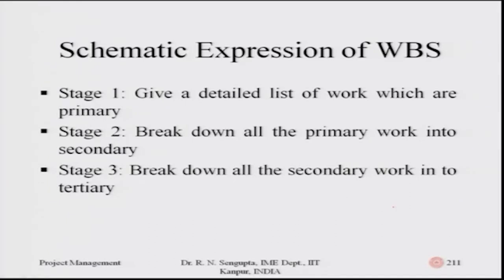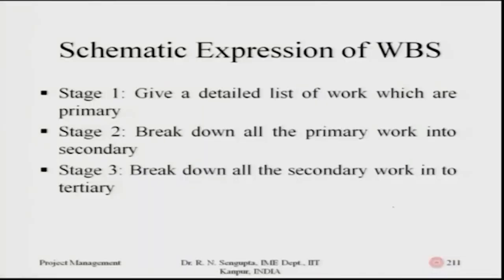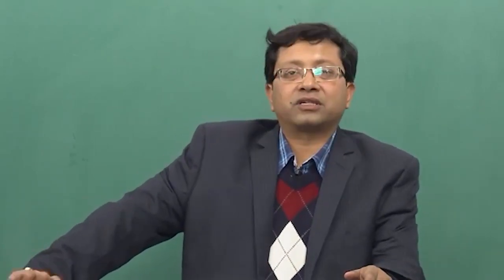Stage 2 breaks down all the primary work into secondary, and what are the linkages between the secondary work inside the primary one, and if the primaries are related to each other or secondaries are related to each other. Stage 3 breaks down all the secondary work into its tertiary one, and also tries to find out whether after the tertiary we have the first level below tertiary, second level below tertiary, and go on accordingly.